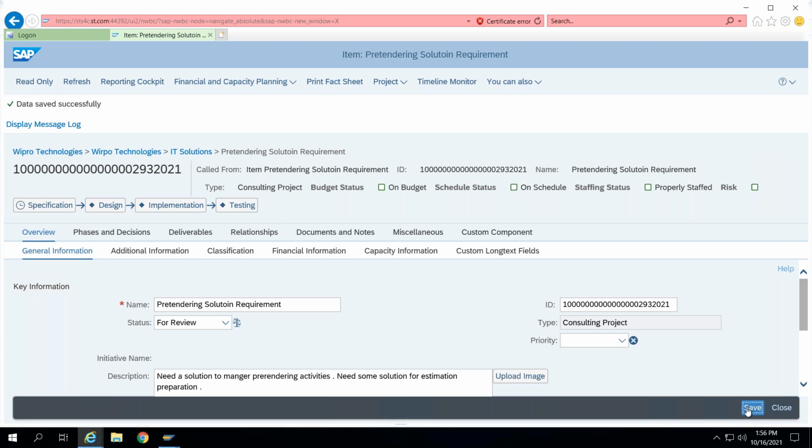So here this is the user status, and based on this user status, we don't have any transaction control. Purely it is being used for workflow. That's it. There is no transaction control, no validation. So let's say I have submitted for review.